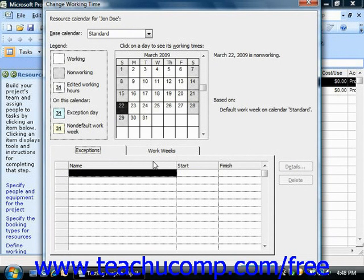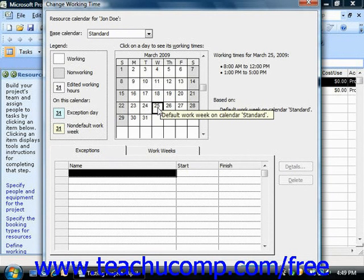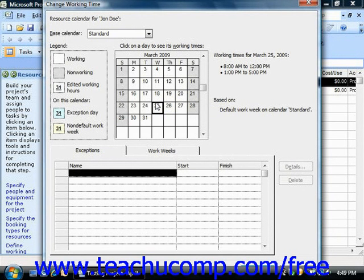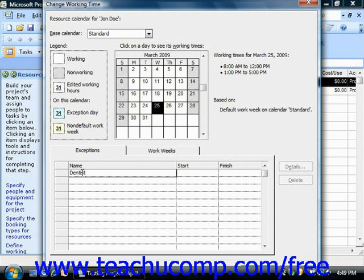To create an exception for the work schedule, click the Exceptions tab. Here you can enter the various days off for the chosen work resource. To do this, you can click on the first day off shown in the calendar if desired. Next, click into the first available blank row within the Exceptions tab and then type the name of the label that you want into the Name column. When you leave this cell, the date selected in the calendar above will be entered as the default values for both the start and finish dates of the time off.